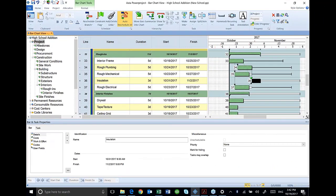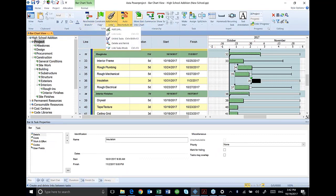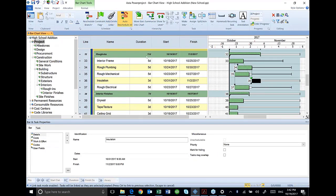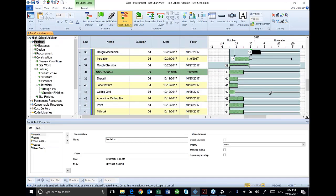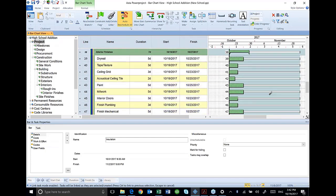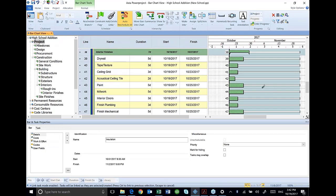The third way to add logic is to turn on the link task mode. Link task mode, you have to be a little careful, but when I turn it on, the order in which I select activities is going to add a relationship between them. So in this section, I've got activities that are out of order.